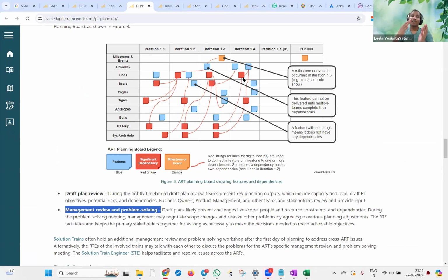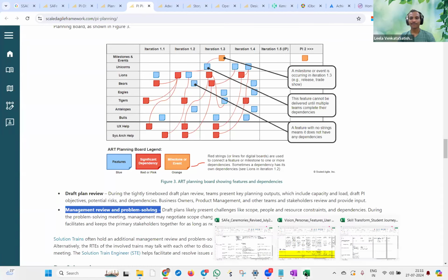The duration of the team breakout for the second time will depend on how many scope changes, how many priority changes, how many adjustments came in. If there are no scope changes or adjustments, we might simply say, okay, let's quickly go through and make sure everything is defined, and we can wrap up that team breakout on day 2. But otherwise, ideally, maybe 1 to 2 hours, or sometimes 3 hours, might be spent realigning the new scope of the revision.